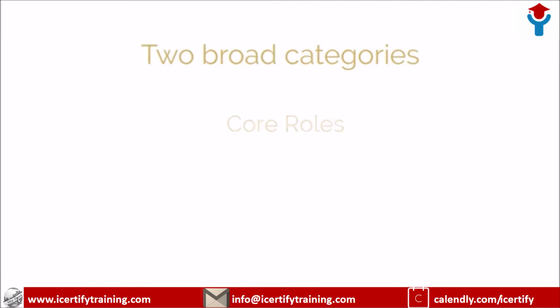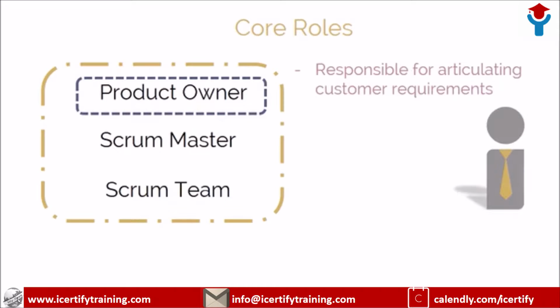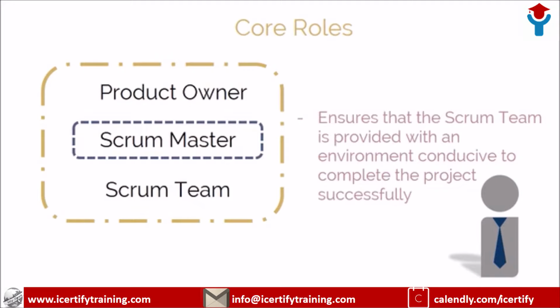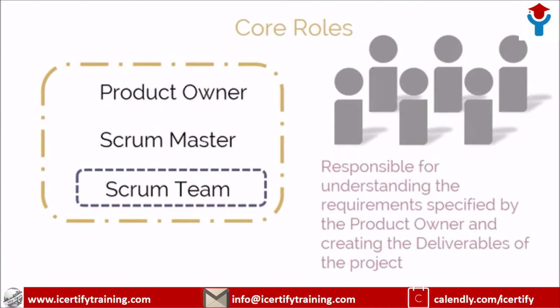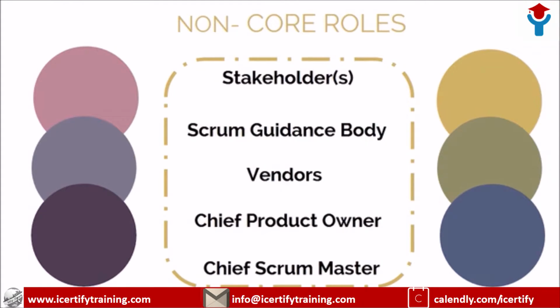Organization. Scrum roles fall into 2 broad categories, core roles and non-core roles. The core roles include the product owner, who is responsible for articulating customer requirements and maintaining business justification, the Scrum Master, who ensures that the Scrum team is provided with an environment conducive to complete the project successfully, and the Scrum team, who is responsible for understanding the requirements specified by the product owner and creating the deliverables of the project. The non-core roles include stakeholders, the Scrum guidance body, vendors, the Chief Product Owner, and the Chief Scrum Master.